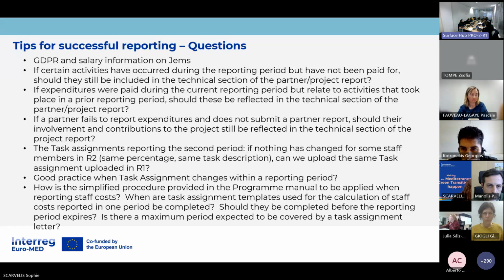Any other question on contracts? What is the EU threshold for the contracts to include the beneficiary or not? We did not put the threshold because it depends on the type, the nature of the contract, and this is why we put a link in the presentation. Or if you search directly on the internet for EU threshold for public procurement, you will find it. The most common one is the one for services, which is 211,000 euros, but it really depends on the type of contract. So please go and see the thresholds directly on the website.